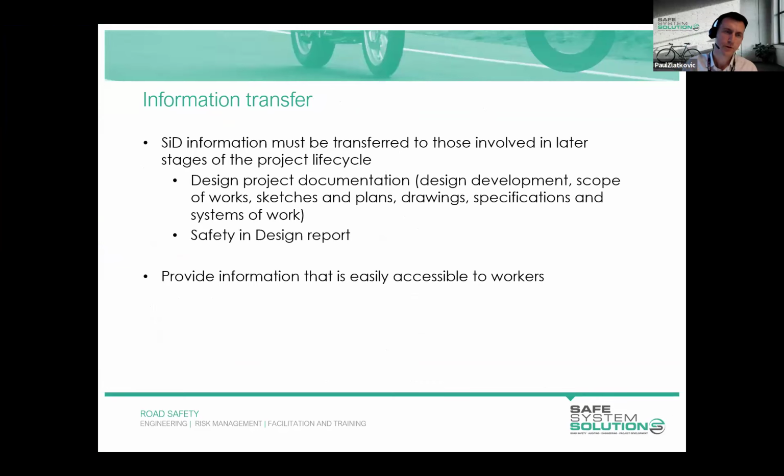So if you've done all that work, you've formed your safety and design consultation group, and everyone's come together and worked on that risk assessment, it's important to get all that information and that work transferred to those people that will need it in the later stages of a project life cycle. So part of that information transfer will include the project documentation, obviously any work method statements that have been developed, if there's any specific ways that the work should be undertaken, that needs to be transferred, as well as your safety and design report.